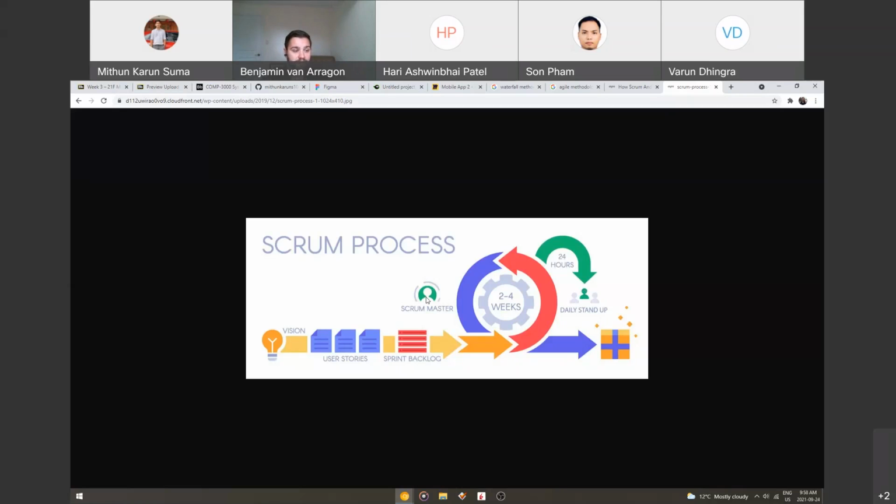And you have a meeting that's led by the Scrum Master. The Scrum Master doesn't actually do any of the development that week. In this case, he might because our groups are so small. But the Scrum Master typically organizes everybody else to make sure that they're all doing what they're supposed to be doing. And then you basically repeat and do this 2 weeks at a time for an entire year. That's what we did when I was working in Toronto.